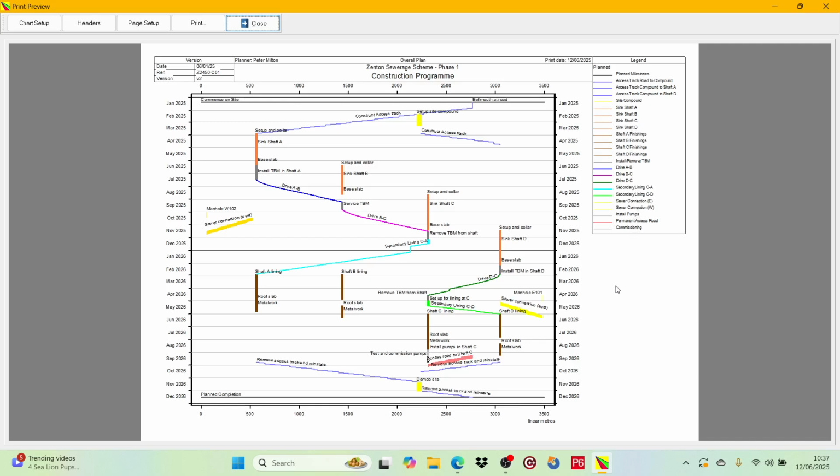Now this is all good and maybe all you need from TimeChainage. What activity codes allow you to do though is to add additional categories of work, which then allows you to create new layouts showing the different aspects of the project. As an example, you could use one of the activity codes to structure the project by final usage. So instead of different line colours for shaft sinking and finishing works, you could have different colours for each shaft